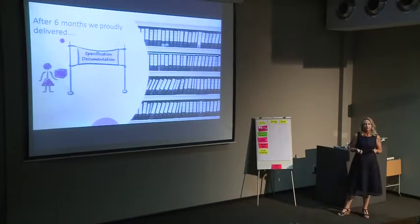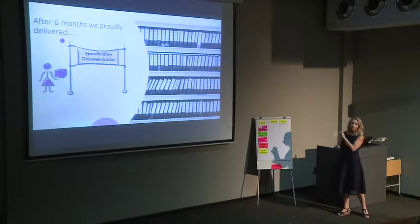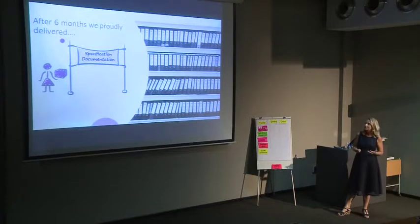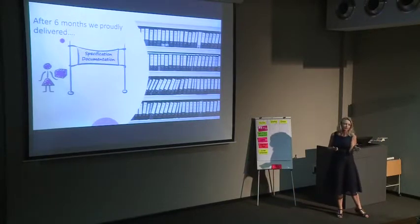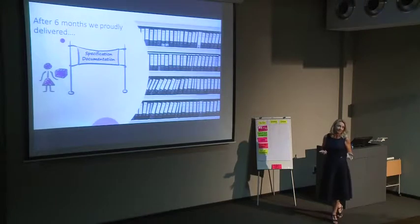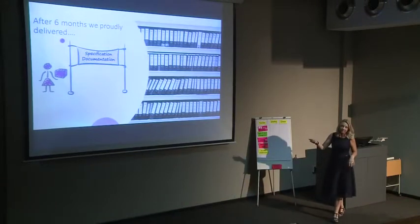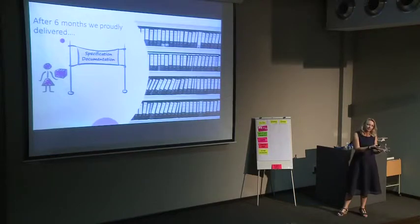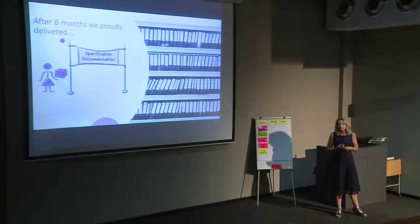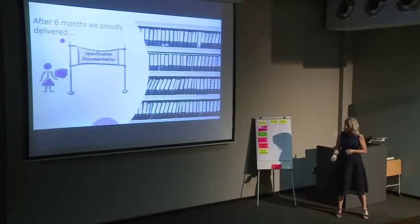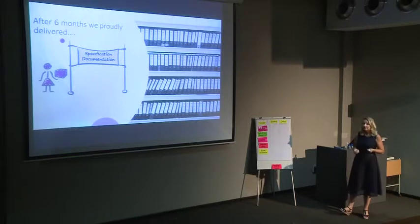As usual, they realized legislation had changed and they needed different information — can we change this, can we do that, we don't want this anymore, our recruitment process has changed. So over a period since signing the contract, they only really started using the HR software after 24 to 36 months. With smaller clients we learned to say: first use the vanilla version, see what works, what doesn't, then make changes. But still it took six to 12 months to implement a solution, and that's when I joined Clientele and learned about Agile.